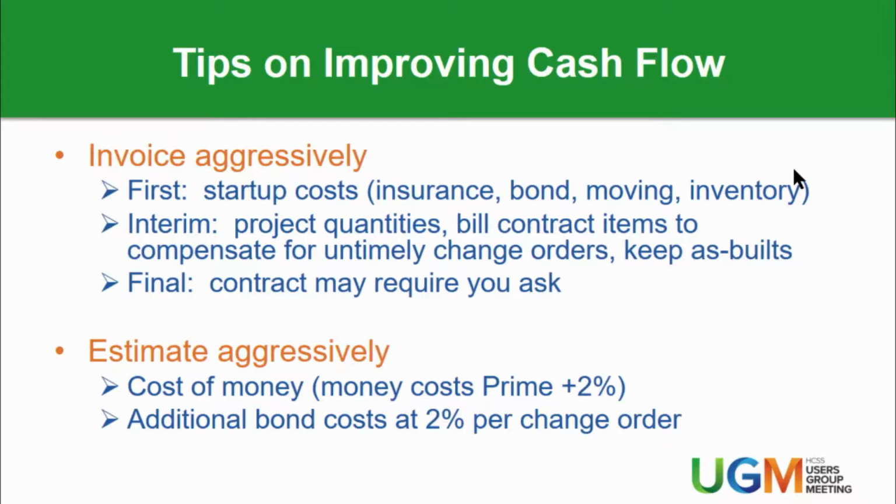Keeping as-builts is always one that always seemed to hold up my money forever. Kind of preaching to the choir here and telling what you know, but keep your as-builts up, because a lot of times that's another tool for owners to actually come in and hold your money.